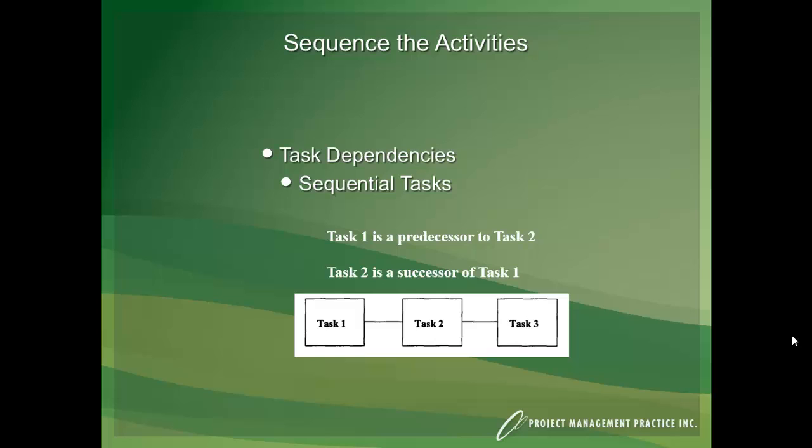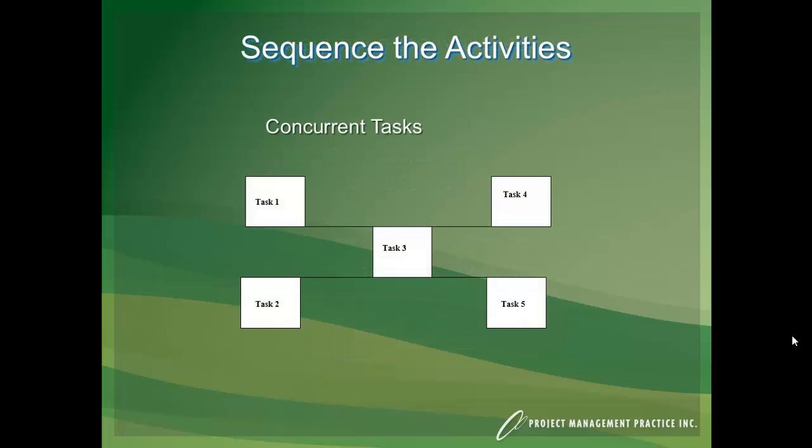And if you look at task 1, task 1 does not have a predecessor, and in fact will be driven by the project start date. And task 3 does not have a successor, so in fact it's the last thing in this project schedule. And that's sequential, and most of that can be accomplished with a finish to start type of link.